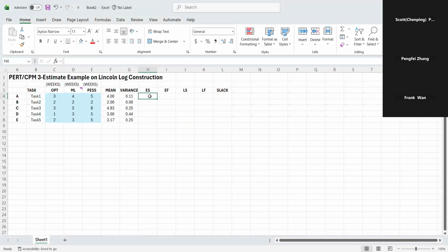If you look at your project network, you find a link directive start. So it can begin with what? Time 0. Or you say now. And use the relative address feature. Earliest finish time is always equal to earliest start time plus the mean duration. And then you can just copy it down to the bottom.